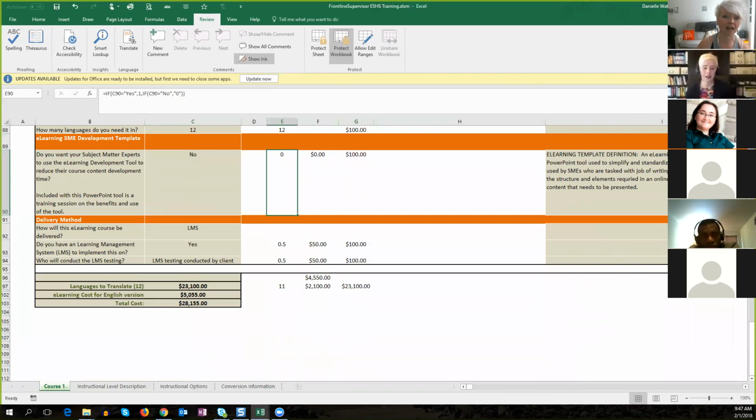And sometimes I have really custom projects. For example, I have one that I'm working on. It's 3 courses that are each 10 minutes long, but one of the courses is really a duplication of the other course with some minor changes. So it's not really a 10-minute course then. So I'll show, this is the number it would normally be, but because we are just doing this piece of it, and everything else remains the same, now we're down to this number. So they can really see where it's coming from. Yep. So that's exactly what we did here.